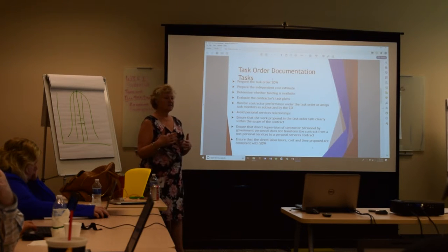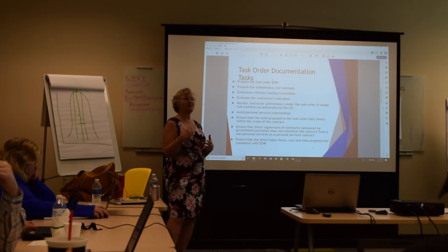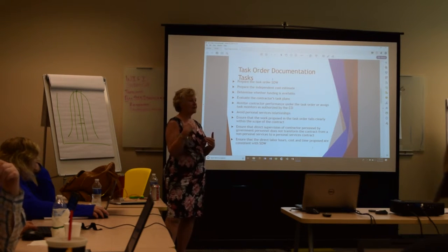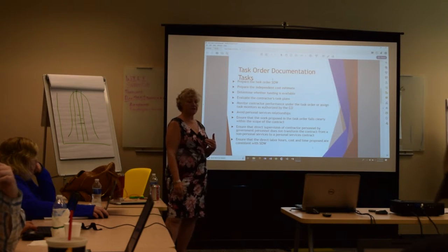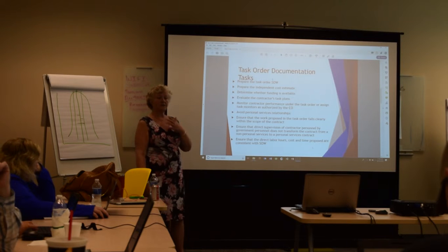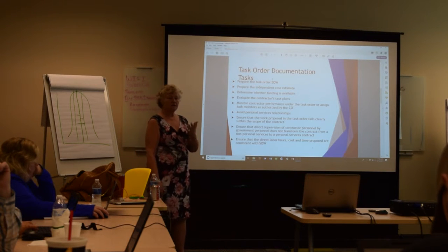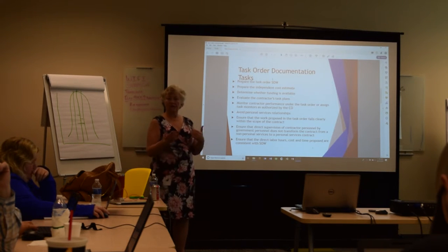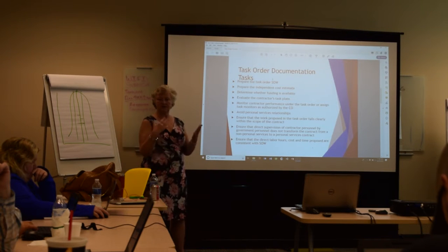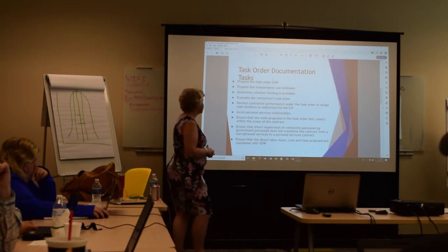So in some cases, they may not have written the requirement well enough that you understand what's being asked for, in which case you would need to revise your numbers. Or it may be that there are things they didn't realize had to be done in order to get this work done, that you know because you've been doing this all the time, in which case they would modify their independent government estimate and accept your proposal.